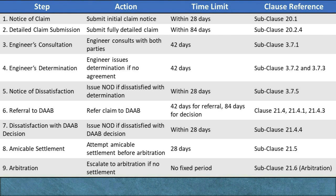To formalize this, the engineer must issue a notice of lapse to the claiming party within 14 days following the expiration of the 84-day submission deadline. If the engineer does not issue this notice of lapse, the notice of claim remains valid. Purpose: This 84-day period ensures that the claiming party has sufficient time to gather and present a comprehensive claim, giving the engineer all necessary information to evaluate the claim's merit accurately.